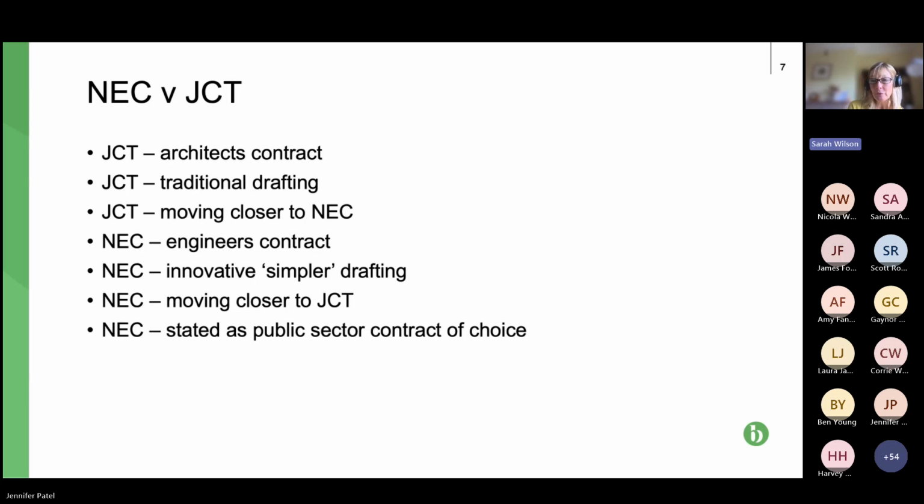The contractor doesn't want to notify claims, but the contract does require claims to manifest themselves, not, as we often see with JCT, right at the end of the project with the final account. So if we can move on to the next slide, please, Jan.